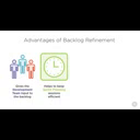And since sprint planning is a time box session, the team is often unable to plan enough work for the next sprint within the time box if the backlog is not properly refined. This means that the team must hold ad hoc planning sessions within the sprint to keep the sprint backlog full of enough work to stay busy, which interrupts the rhythm of the development team and is frustrating for the entire Scrum team. But regularly performing backlog refinement has 2 other advantages.